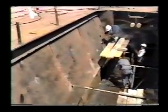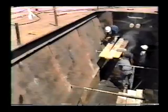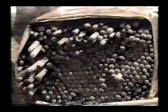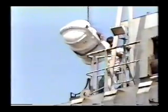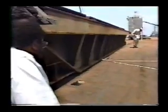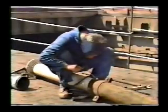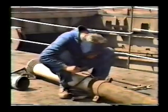A temporary bulkhead is installed to maintain the carrier vessel's stiffness and to keep the hole for the sonodome watertight. Several hundred meters of welding rod is necessary to fasten the dunnage on the deck of the heavy lift vessel. All arrangements are carefully controlled not only by Weissmuller, but also by American naval experts and an independent surveyor. Pipes are installed to supply the frigate with cooling water.